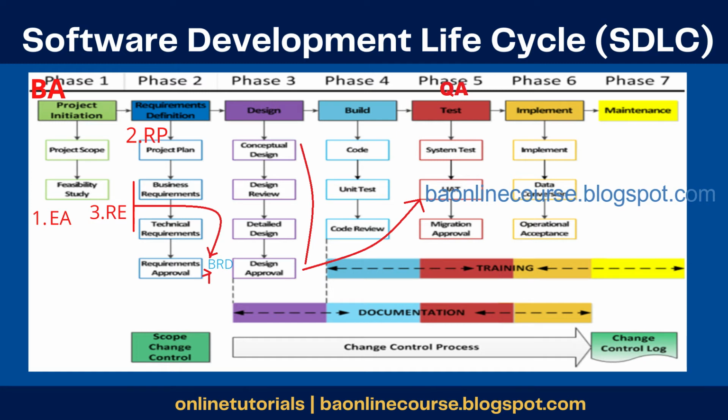So phase 4 is where your actual programmers come into the project. So till phase 4, maybe in the first 2 months, you don't need any developer or a programmer in your project. Okay, so maybe the first 1 month you will capture the requirements, the next 1 month you design it. Maybe the third month you would get the actual programmers to start programming. Okay, so phase 4 would involve actually the development of the software. The programs are written in the build phase or coding phase.